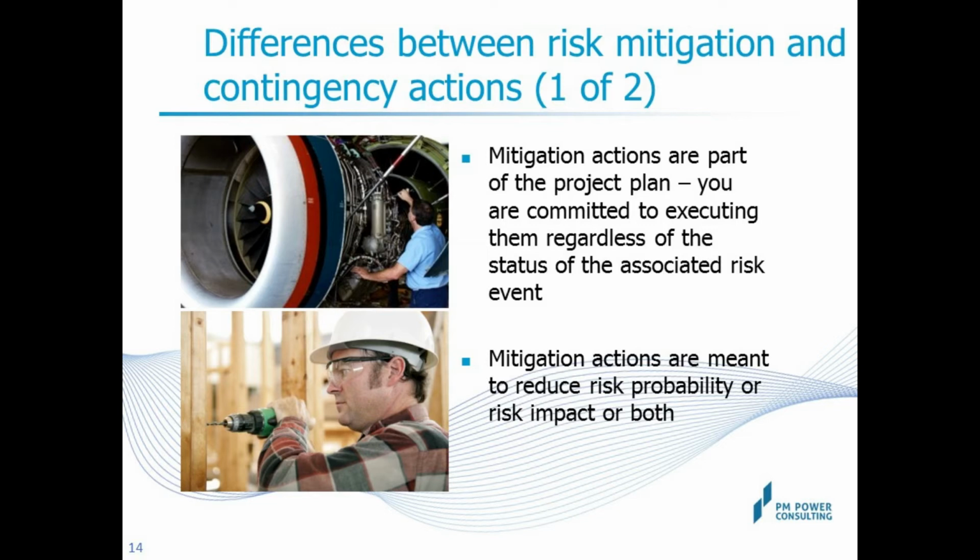Each fresh developer will be assigned a senior person in the team as a mentor who will educate and guide. This mitigation action has been conceived to address the risk that inexperienced developers may produce poor quality code. This action is now part of your plan.